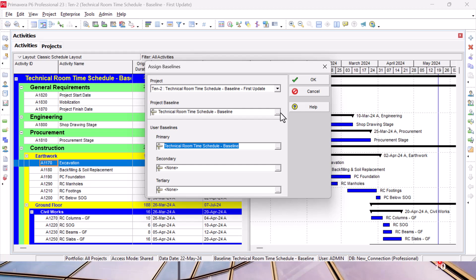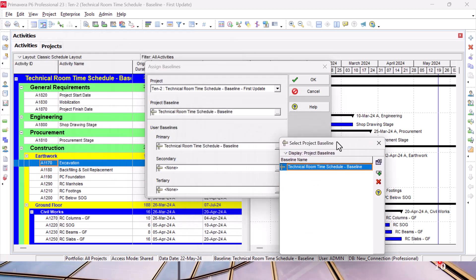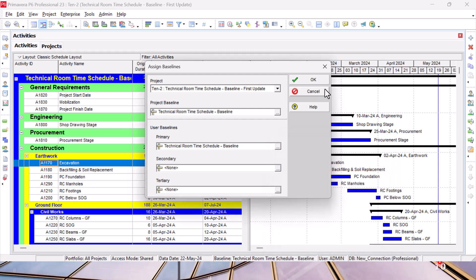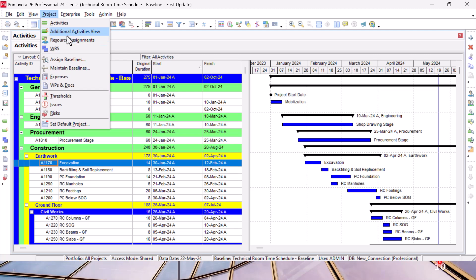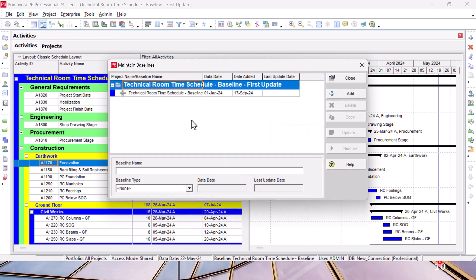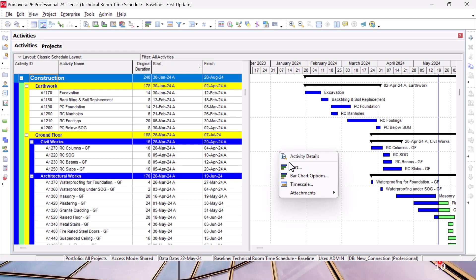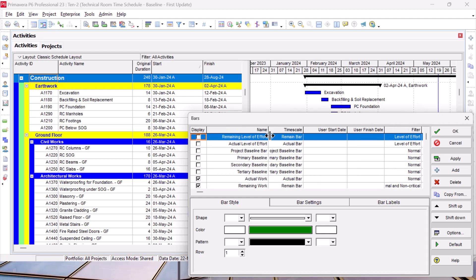First, we would like to show the baseline. Before doing this, I'll be sure that in my project assign baseline I have here baseline assigned. If I cannot find a list of baselines here, it means I didn't do the maintain step. In that case I have to go from Project and Maintain Baseline, then do the maintain step.